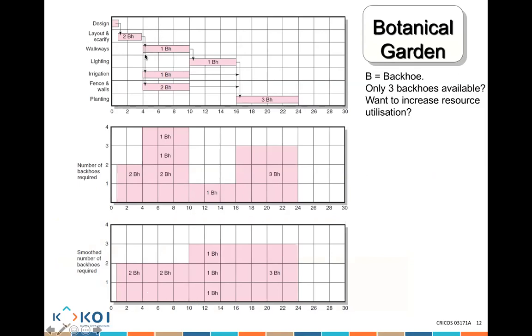All right. If I have now 4 people between weeks 4 and 10, and I only have 3 people available, let's look. Now this one has a slack. I'll push this forward, which means I'll now need 3 here and 1 here. That's 3 people. And then I will say, okay, great. That's the last activity. I'll have it here, between 16 and 24. Now notice how my maximum resources required used to be 4, and now my maximum resource required has actually dropped to just 3.